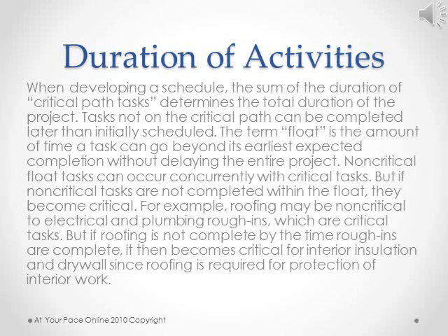After the project tasks have been grouped and sequenced with duration times, the next step is to schedule contingency times. Ideally, project progress without delays. In the real world, however, delays are inevitable. Material deliveries, unforeseen job site difficulties, inclement weather, work order changes, or the owner not sure of style or color choice may cause delays. When developing a schedule, the sum of the duration of the critical path tasks determines the total duration of the project.